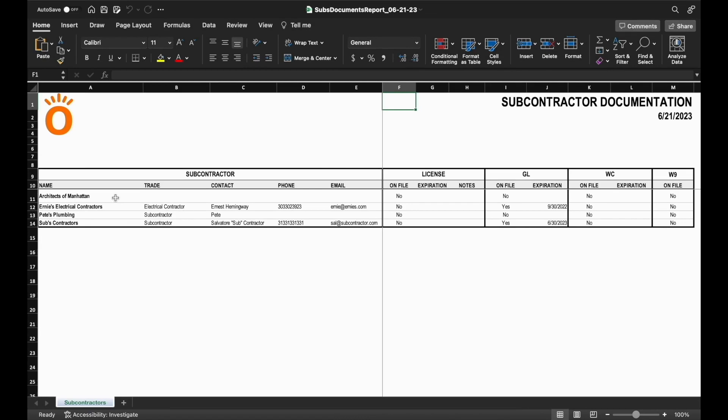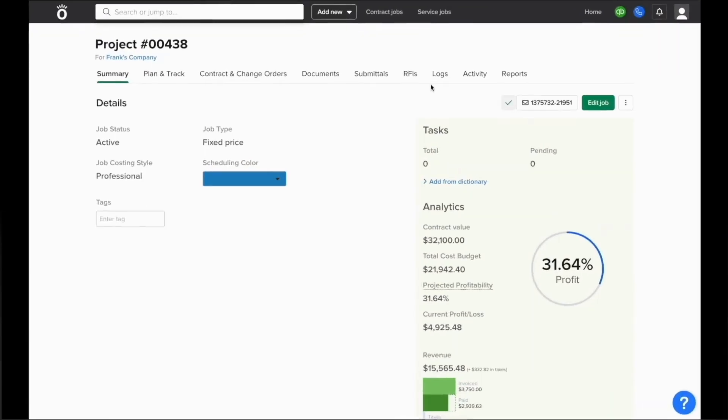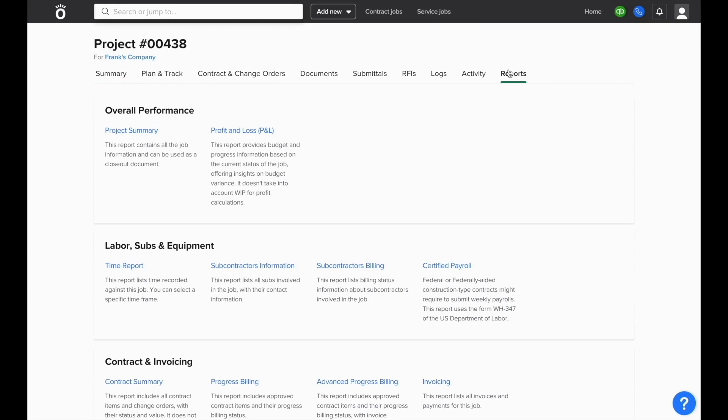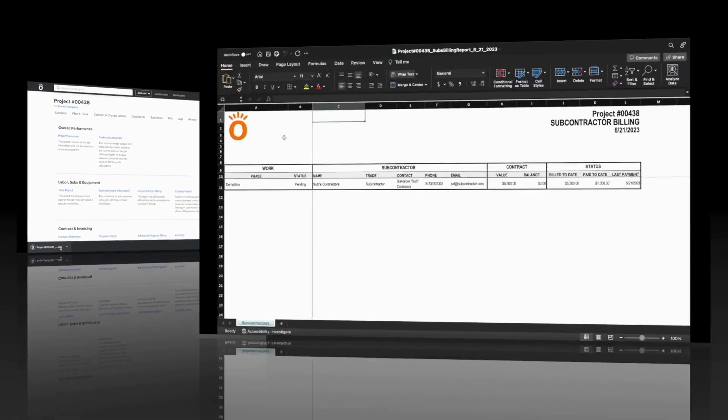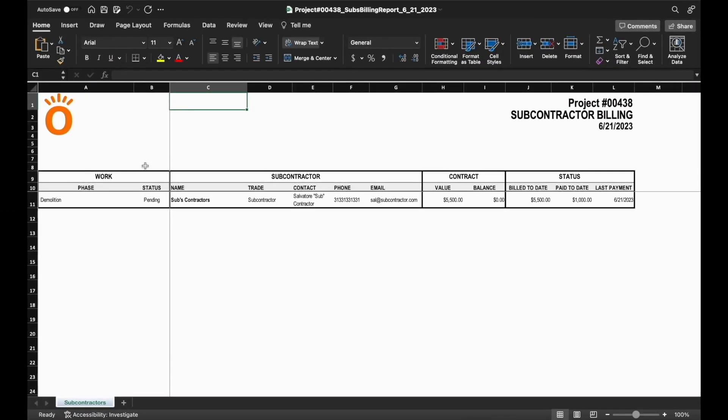And if you need a report that runs across an entire job to show different subcontracts and their current status of billing, you can run the subcontractors billing report in the reports section of a project. You'll get an excel sheet that shows all of your open subcontracts, the total value, and the remaining balance, the amount billed to date, and the amount paid to date as well.